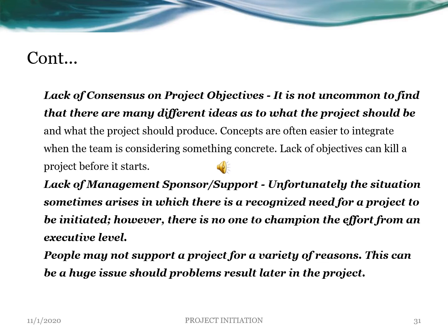Lack of consensus on project objectives. It is not uncommon to find that there are many different ideas as to what the project should be. Lack of management support or funding. Unfortunately, the situation sometimes arises in which there is a recognized need for a project to be initiated. However, there is no one to champion the effort from an executive level. People may not support a project for a variety of reasons. This can be a huge issue should problems result later in the project.